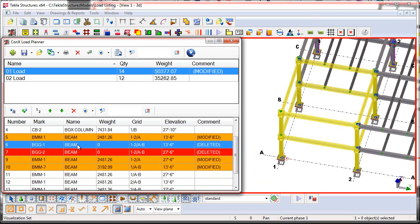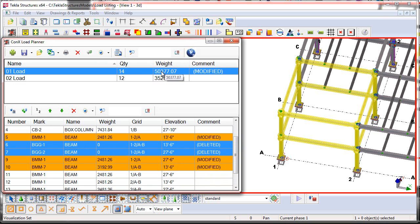Also, there are two assemblies that were deleted out of the model, and the tool will automatically zero out the weight here, so that way it reduces the weight in the load list. And then we can properly add additional assemblies that might be here nearby, and move them to this load to optimize the load.